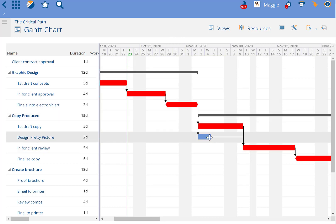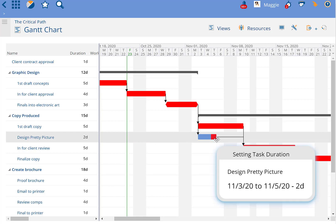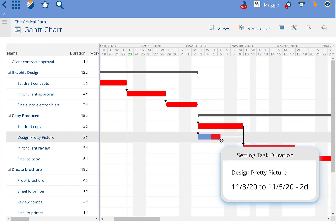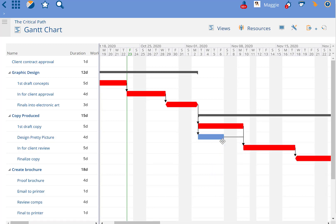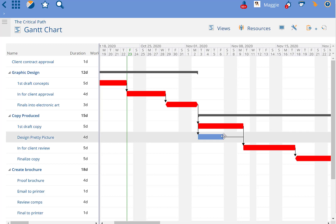This task has some float that if it takes a little bit longer to finish and goes four days instead of two, it's still not affecting the end date. The first draft copy is still going to have to take longer.